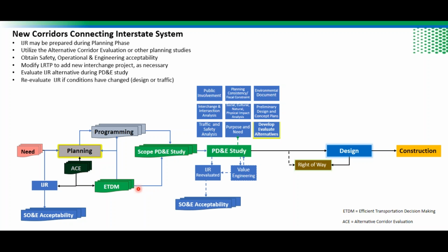So there may be some conditions where the IJR concept done before PD&E changes, because of the reason that Edward said, design or traffic changes. If that happens, then you'll have to reevaluate again. Our goal is to have whatever we have from the planning not be changed during PD&E, but yes, there are some conditions which you cannot control. If the concept has changed, it has to go back into the IJR process to be reevaluated, and to talk about